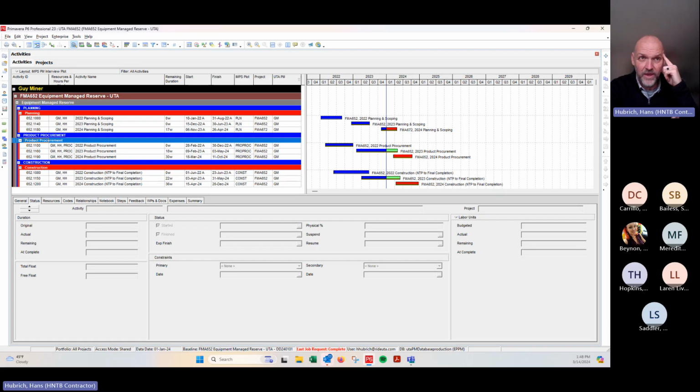And the way that Pam, at least from what I know, pulls together the program schedules is she'll look to see, okay, I want to make sure that all of the schedules have been updated within this window, and she can set a filter to show her, yeah, we've got everything updated starting somewhere around the middle of December through the middle of January, and any project that has a data date in that window is good to go. Or here's the projects that haven't been updated in that window and someone needs to go update them.